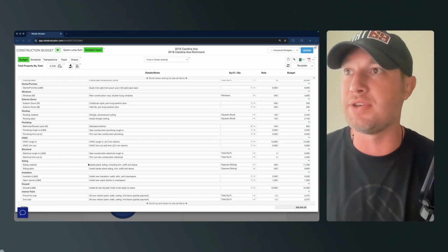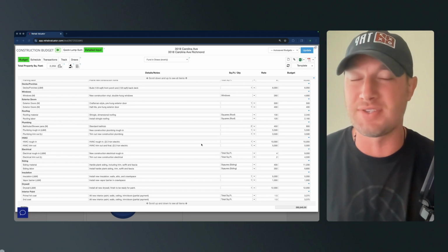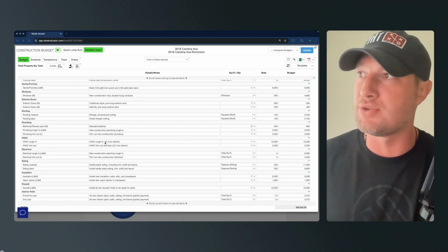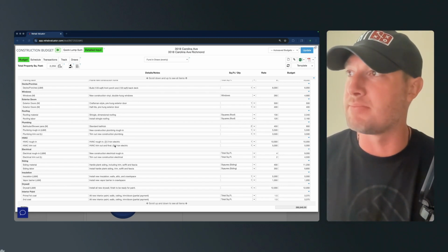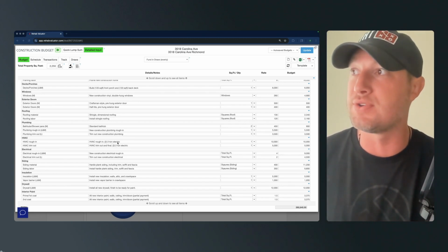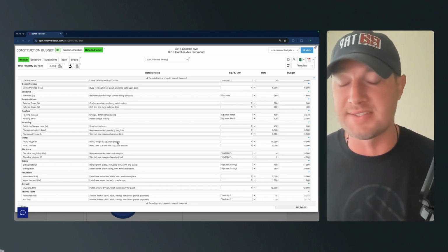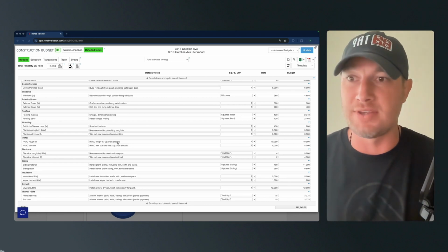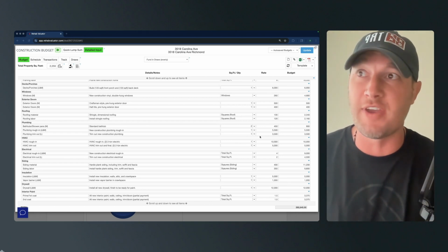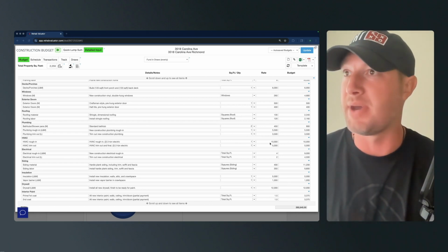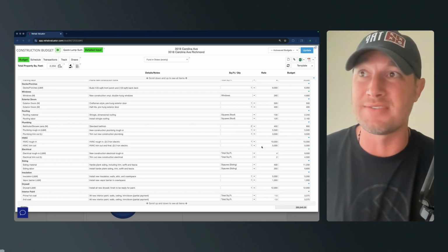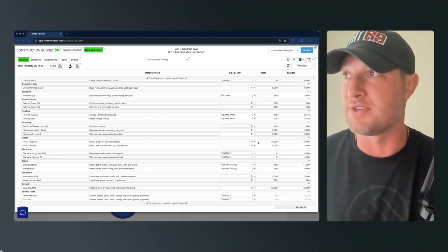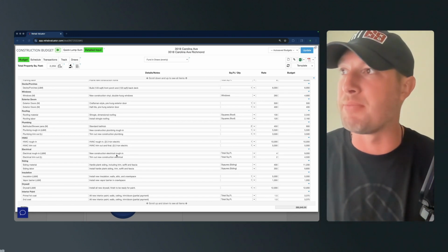Here with HVAC, you'll see I estimated by square footage. I typically estimate by tonnage. So you can go 2 ton up, 2 ton down. So two 2 ton systems. If you say, let's say $4,000 per ton, then you can see it should be around $16,000. So it's very similar to what I'm estimating by square footage. As a matter of fact, I did a custom value with this. So I'm probably even confusing you there. But just remember, that's how you do it.